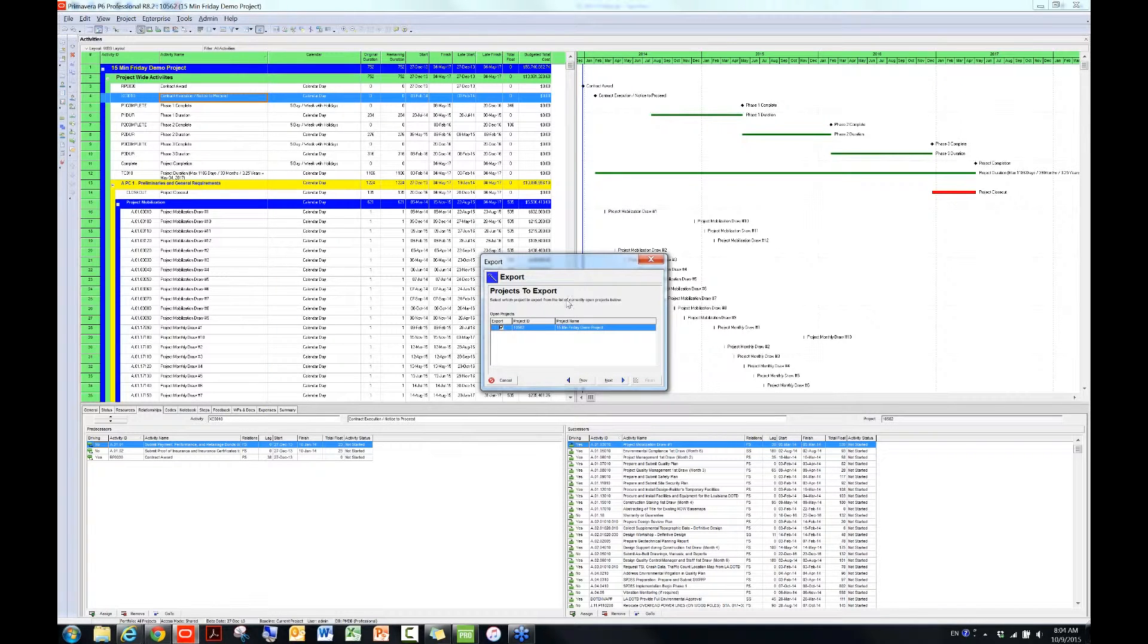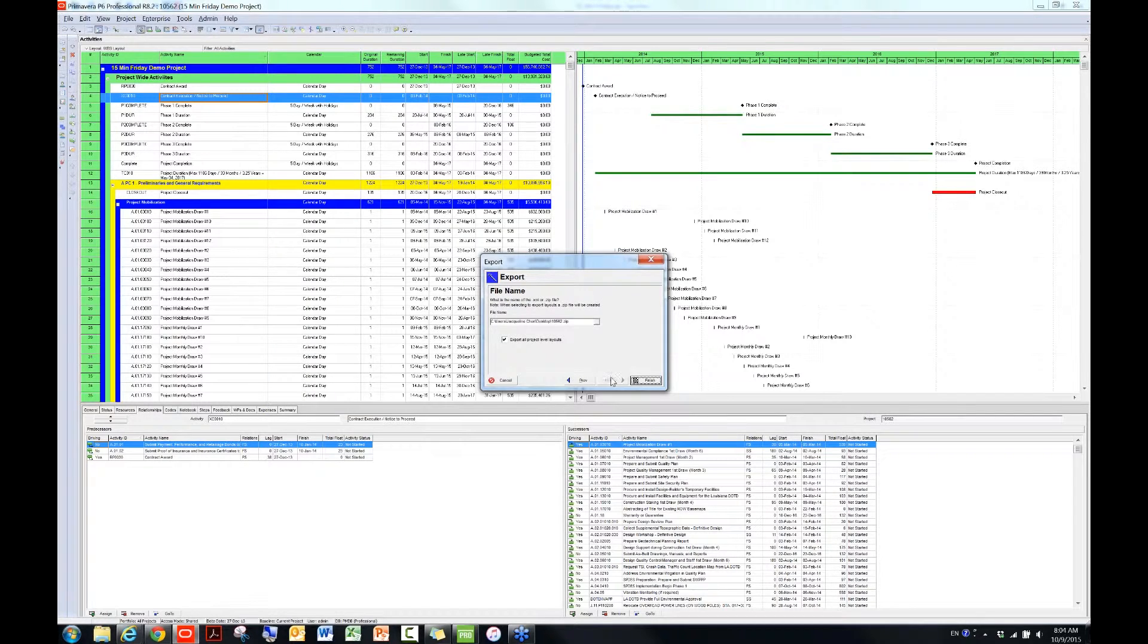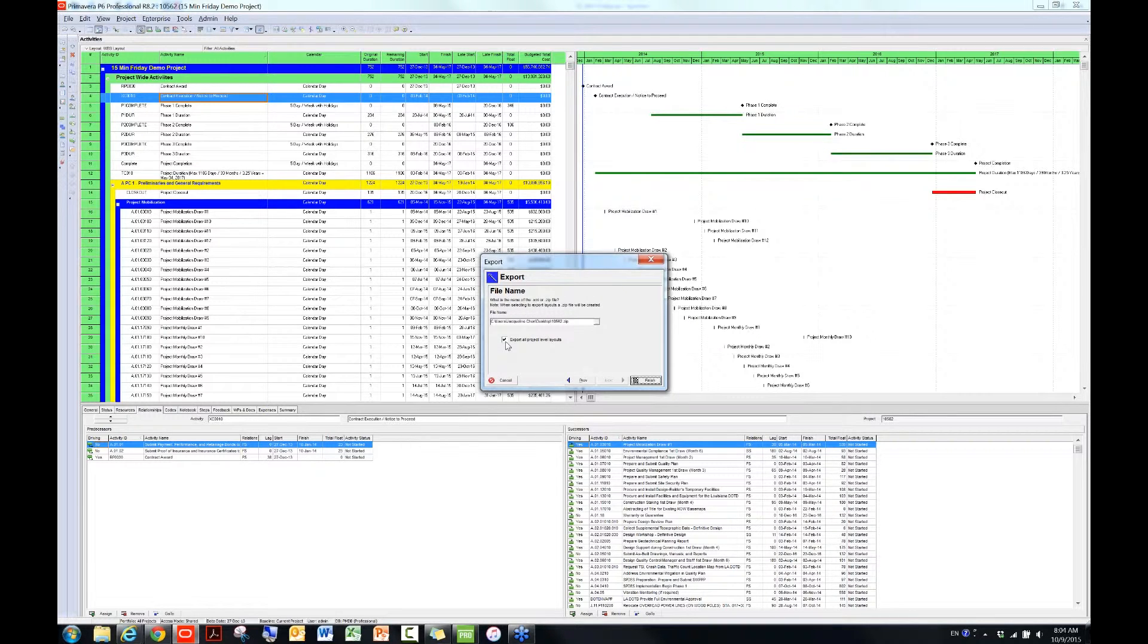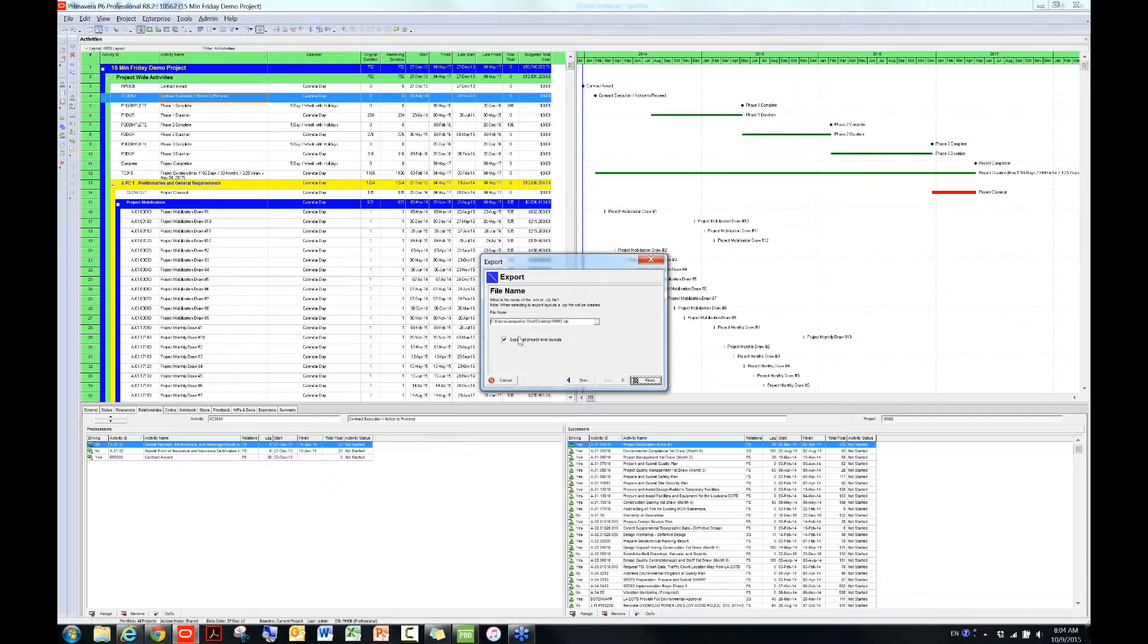In this window, we are just going to leave the default settings and then click on Next. And then in this file name window, you want to make sure this box is unchecked, which is Export All Project Level Layouts. So if you uncheck it, the file extension will become XML, which is what we need.